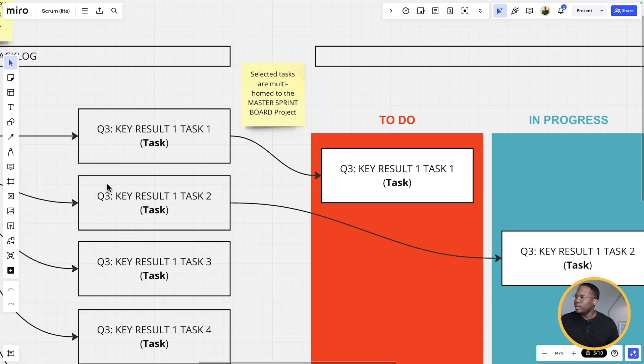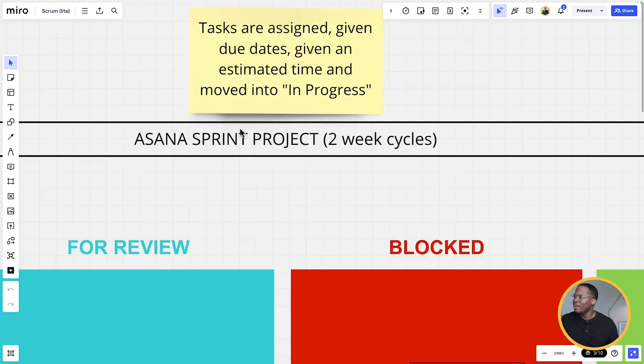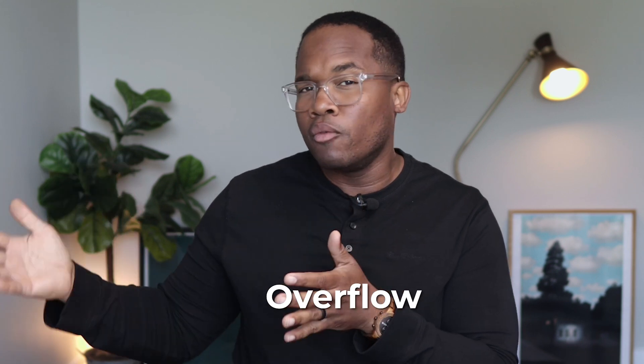We're going to take these two tasks as an example — task one and task two — and multi-home them to our master sprint board. We're running sprints in two-week cycles. The first week is the actual sprint, and the second week is more or less the overflow to take care of tasks that didn't get completed in that sprint. We want one-week sprints, we want to assess the work and get it done within that timeframe, and anything that isn't accomplished either gets moved to the next sprint or gets reevaluated.